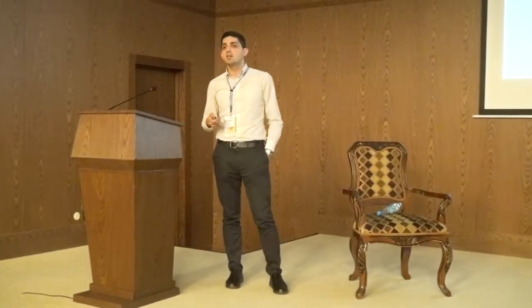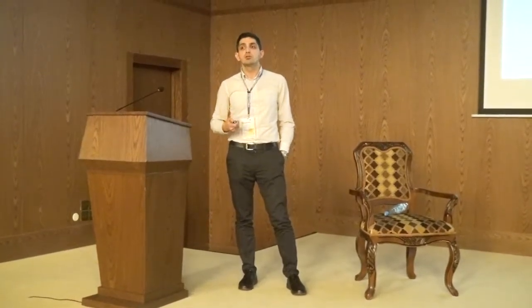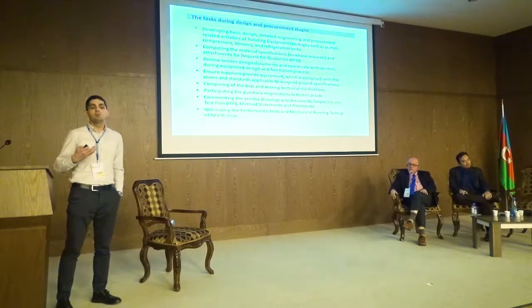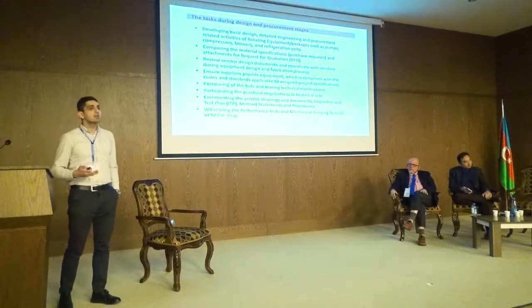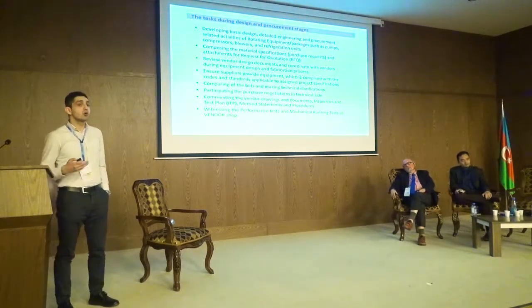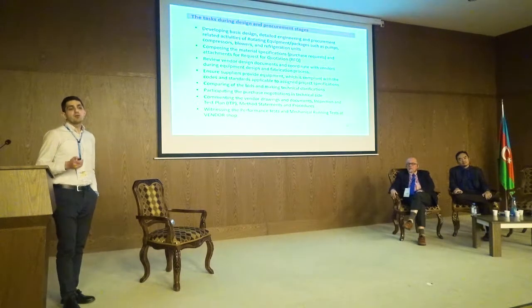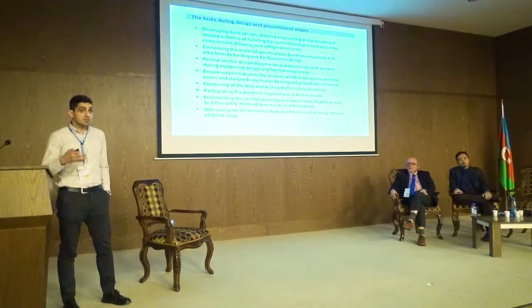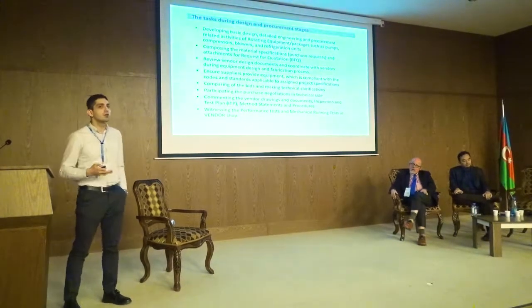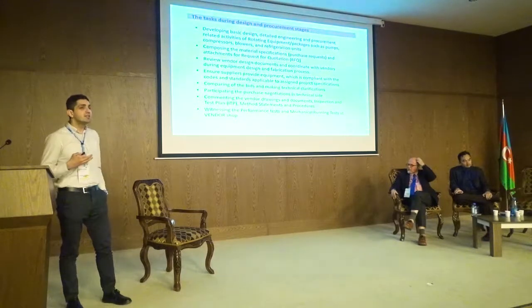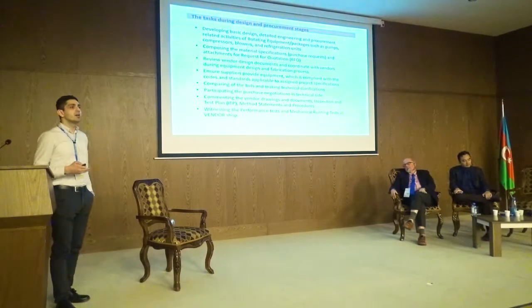So the requisition bids are being made to the vendors, and the vendor makes bid proposals. Like they propose rotating machinery in return, and then the rotating equipment engineer must do a technical bid evaluation. So he has to investigate all these documents. He has to see whether the rotating equipment being offered is in conformance with the standards that are mentioned in the design specifications, whether the vendor can fully provide all the scope of work and scope of supply. And of course, once the vendor has been selected, once the rotating equipment has been selected, then the rotating equipment engineer during the project phase can also make some workshop visits, can go to the vendor workshop and witness the performance tests and some other inspection tests.